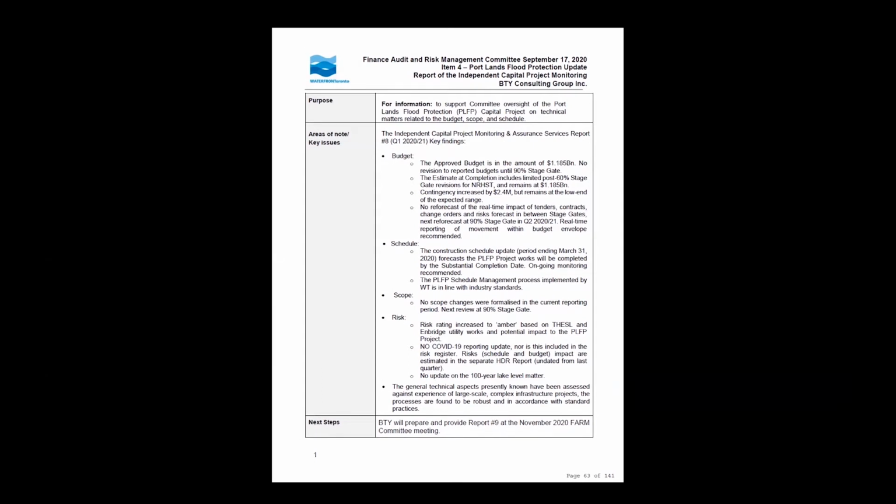So the bonding companies are obviously doing regular financial checks on each of these subtrades, and then we monitor what's happening in the industry and whether there are any issues that come up with any of these trades. So it's happening regularly, and we've also got provisions in place because there may be a circumstance where one of the trades is not capable of finishing the job. We would then look to the bonding company to step in and acquire other trades that are able to finish the job. We haven't had that issue to date on any of the projects that we're currently doing. We've experienced it in the past, but not currently.